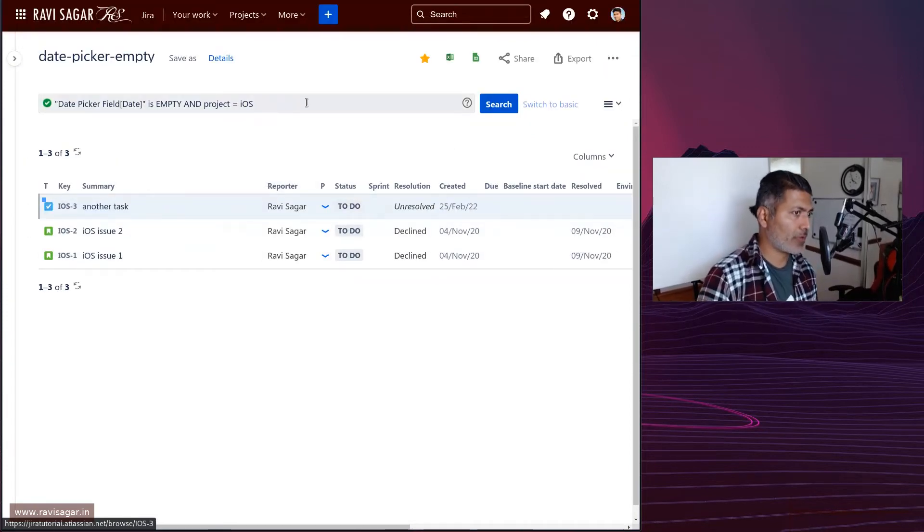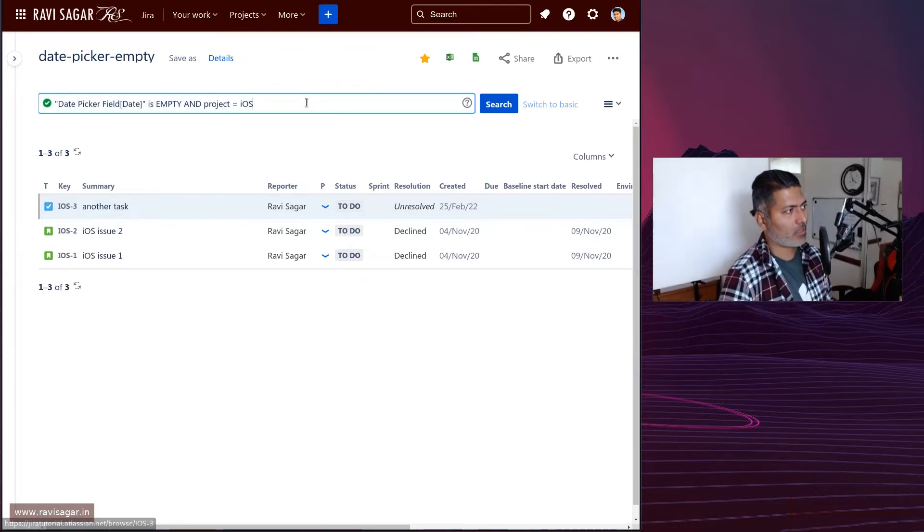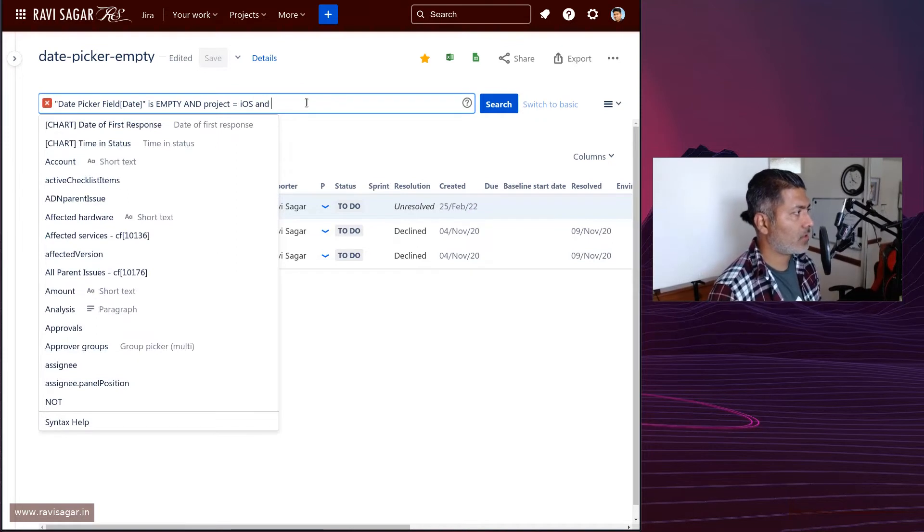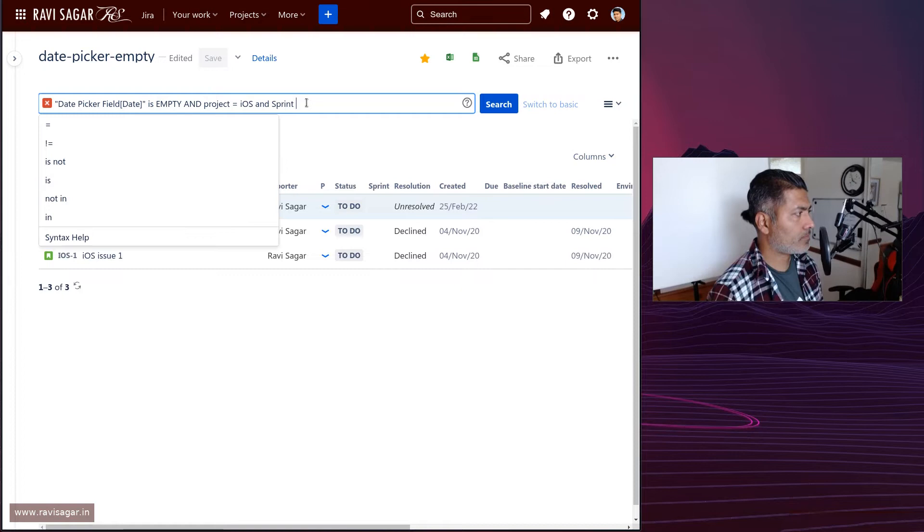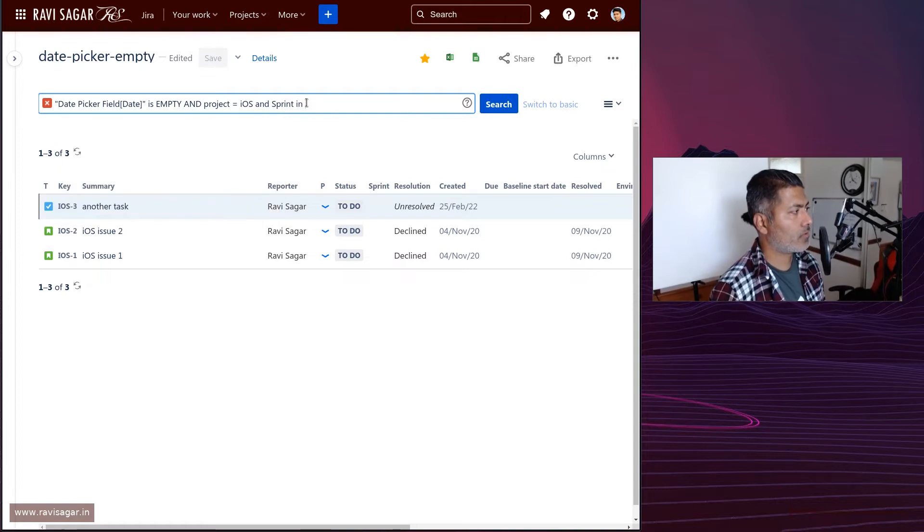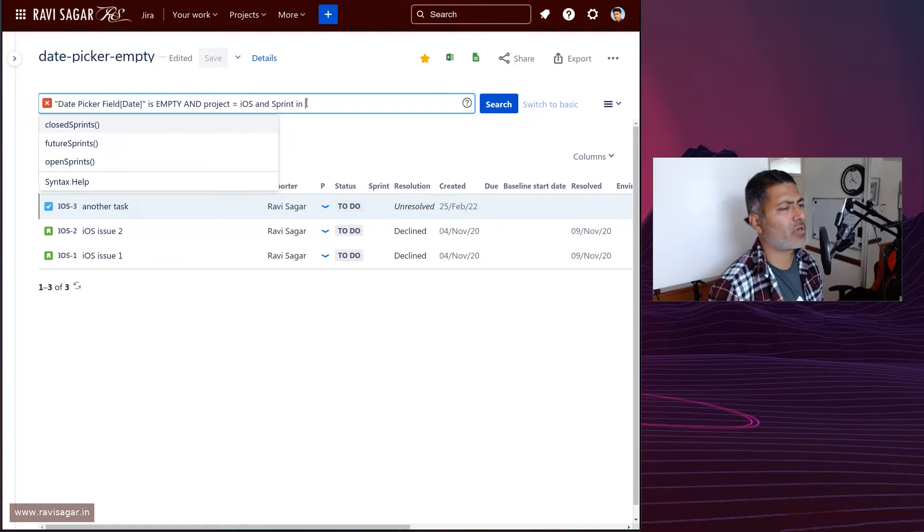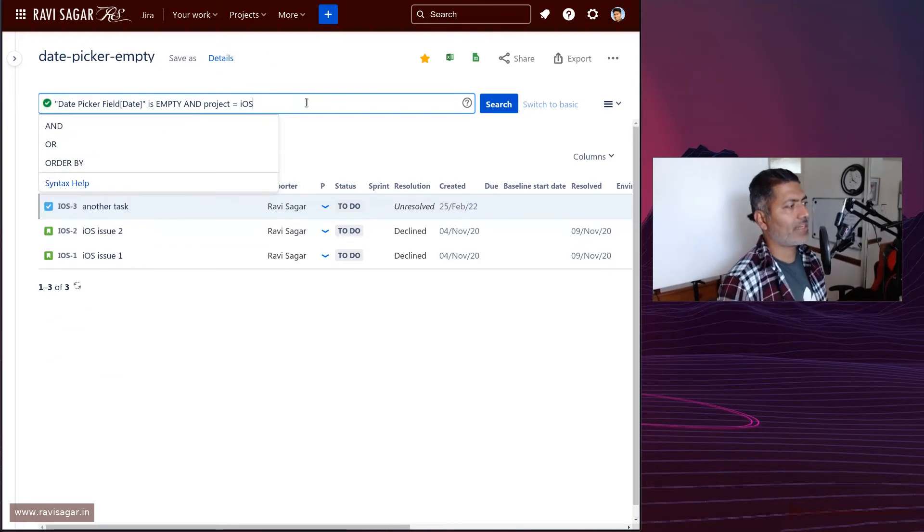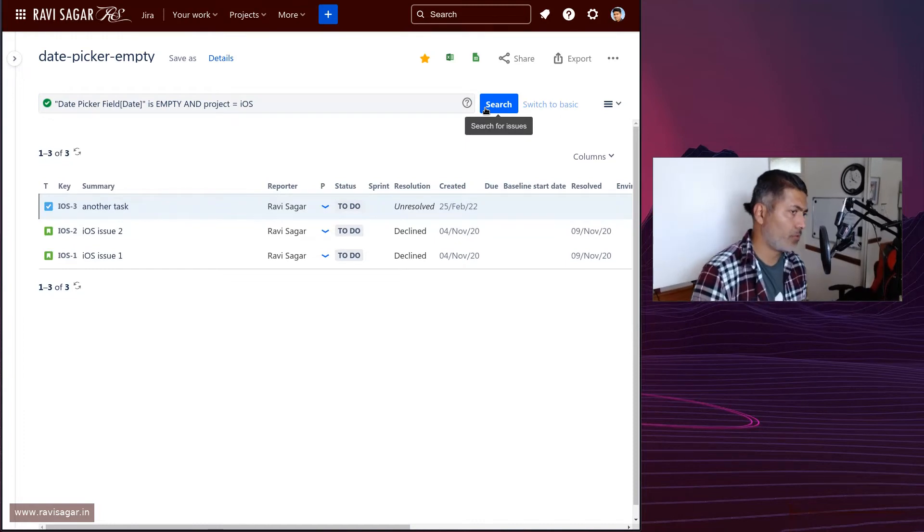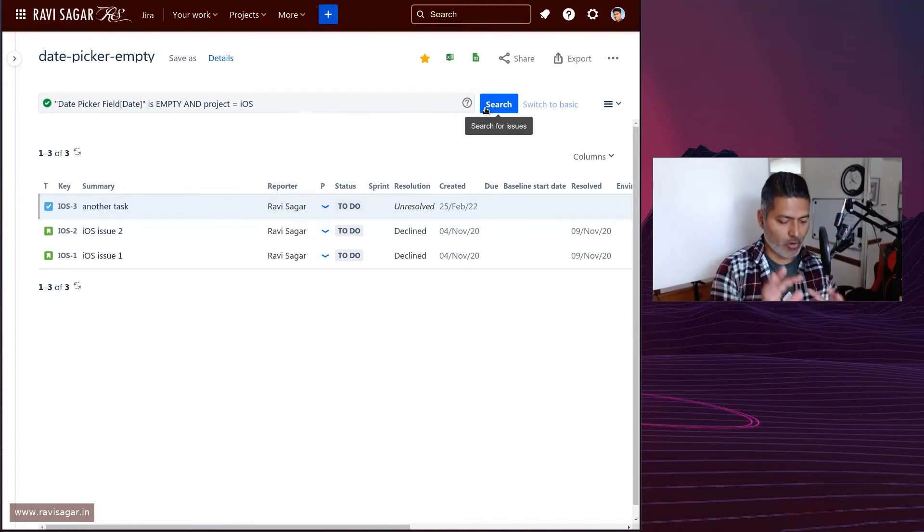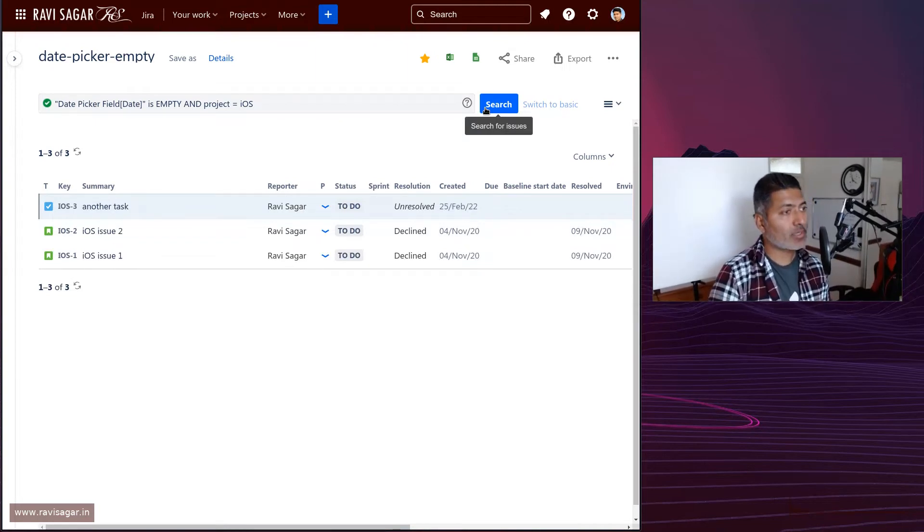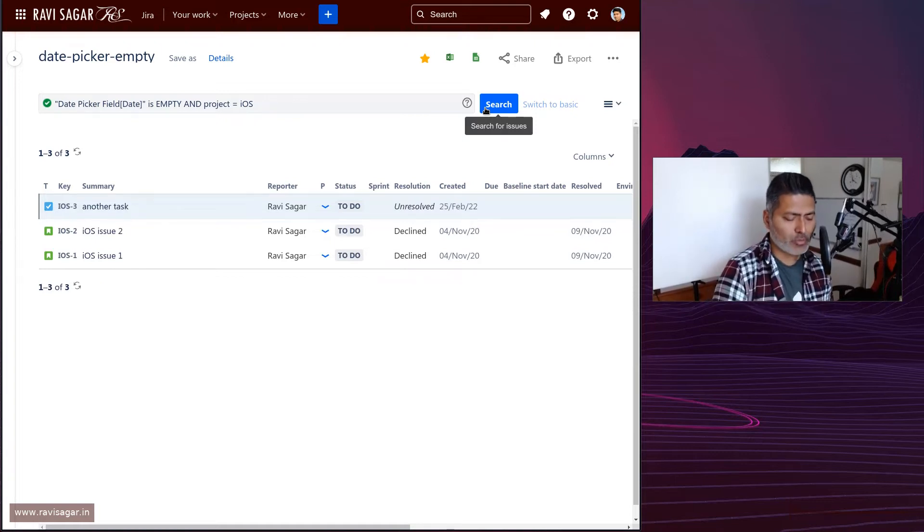This is just one simple query, but you can do something else. Maybe you can do 'current sprint', for example, if there is an issue in the current sprint or future sprint. Maybe you want 'sprint in', let's type here 'feature sprint and current sprint' or whatever. The idea here is that you want to ensure that if the issues are relevant to you - maybe these issues are within your scope, it could be project, it could be sprint, it could be current sprint, it could be future sprint, or maybe upcoming sprint - then you want to make sure the field is filled in.